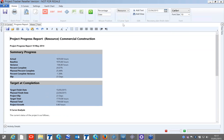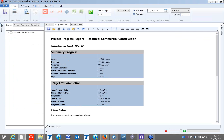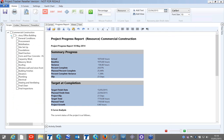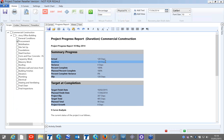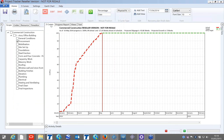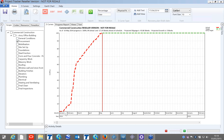The same applies for resources. You can look at the resource view and total hours, showing the project totals. You can also look at your WBS and quickly analyze. For example, this report was for the overall project, but I can simply focus on the procurement part. Please see how the figures change — procurement shows 120 days actual, and procurement is 100% completed. You can see directly what the planned finish date was and what the actual finish date is.